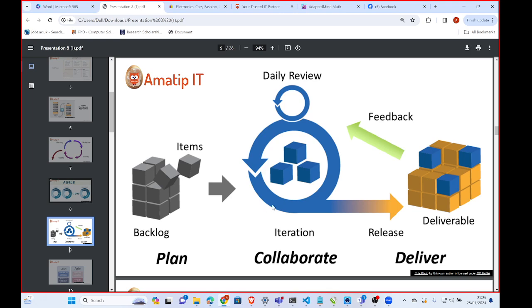So you can see we are delivering the product bit by bit, and that's what we call incremental development. We did not develop everything at once. We are developing it incrementally. Once we finish one particular bit, we move to another one. We finish that, we move to another one. We deliver, we get feedback, it's okay. It's only when we get feedback and the customer says it's okay that we move to another one.